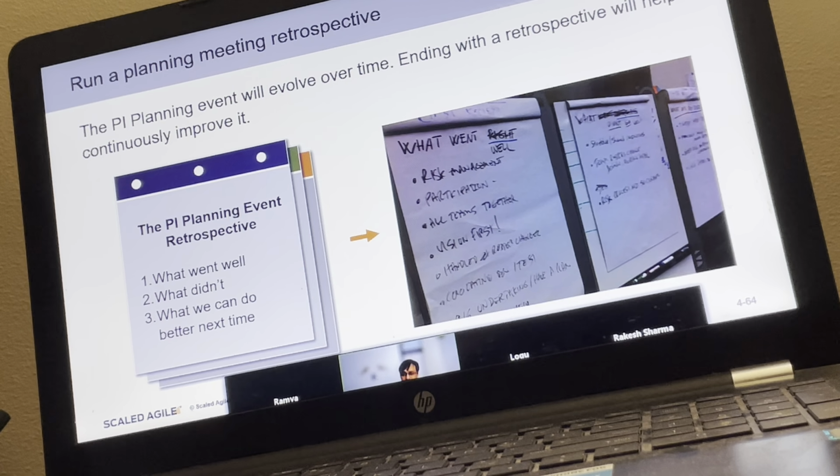As I said, the first agenda is this one. The next agenda will come from your retrospective meeting. You can say, okay, let's do it in a different way, and this is how we should run our PI planning meeting. Many times after 2-3 PIs, your PI planning meeting may start from the draft PI plan review. Teams may do offline planning in advance, so people don't take the first breakout session; they do that work one week before.